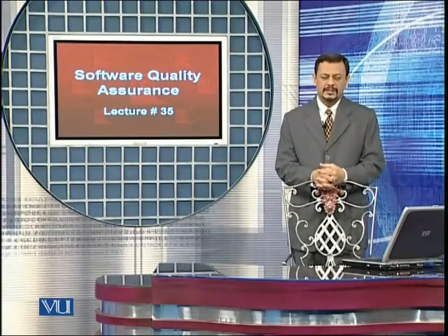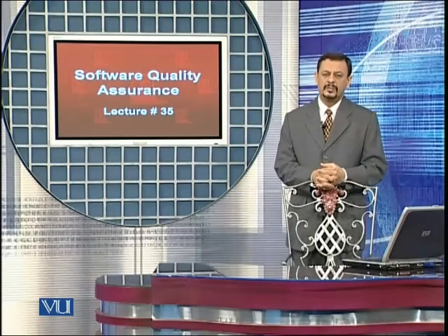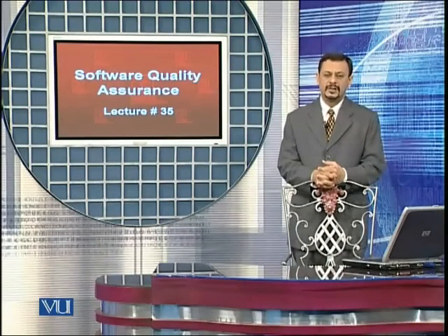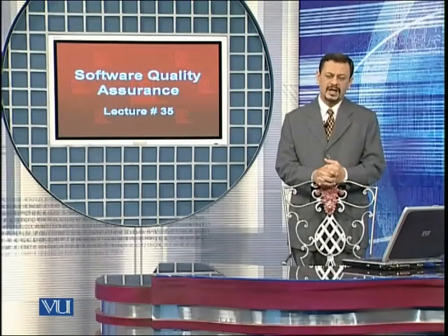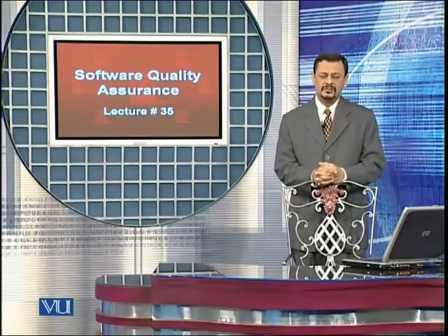You know that the change control process is a very formal and elaborate process, especially for those work products which have been released, but even for those which have been baselined but not yet released to the customer.